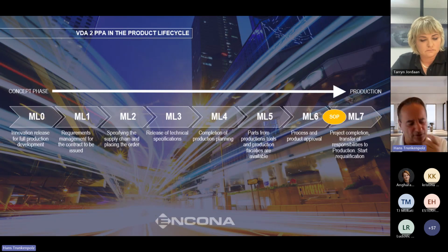And the product variants, then it also allows the so-called stepped approach. A stepped approach can make a lot of sense when you have certain tests. Color approvals, for argument's sake, is a very time-consuming process. So that you do a stepped approach of submission, that you start with a certain package, and then other test reports that come later, like color approvals, do it in the stepped phase. So you can identify already at what times is coming what, to not violate any requirements and to de-stress also lab capacities.